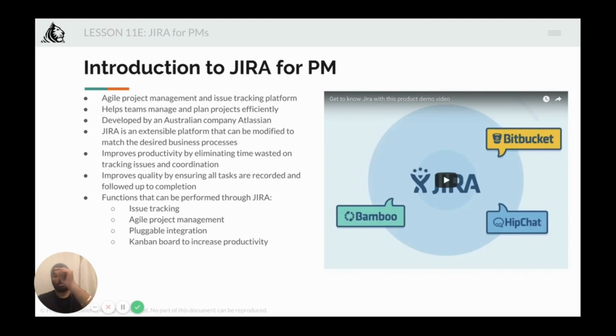You make a to do, and then you start moving to do one to doing, and then you start working on it. At times, certain companies will put a certain limit on the doing column, on how many tasks you can do at a certain point of time. They do it so that if there's a task that gets stuck, let's say task number three is stuck, at a time only one task can be in the doing list.